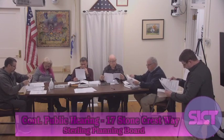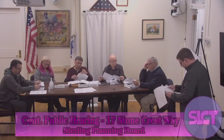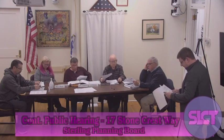Hydrology and stormwater management. And I want to say that Graves' letter only addresses items that were left open from the previous review. So now I'm jumping from 1 to 11, just to make sure everyone's keeping track of that. We got you. Yep. Hydrology and stormwater management. Originally, no information was submitted. The applicant needs to demonstrate compliance with the Massachusetts Department of Environmental Protection Stormwater Standards and Stormwater Handbook. Grading south of the building shows that stormwater runoff will flow southerly towards an unknown location. August 8th, 2023, acknowledged. The design engineer responded that the earth removal operation and accessory buildings are construction phase activities to ready the land for future development. GEI does not disagree that the site is likely to be developed after earth removal activities cease.